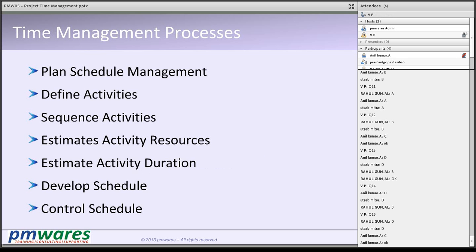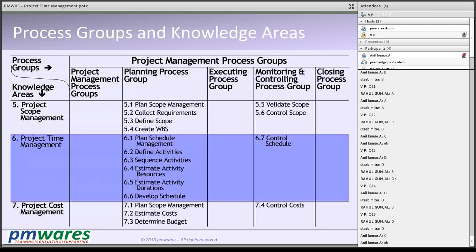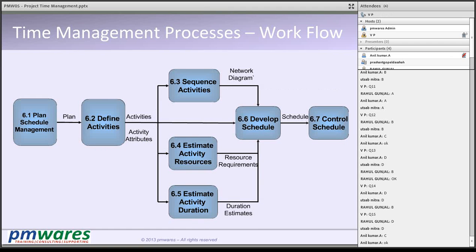Here we will understand how we can develop a schedule and how we can maintain it. If you prepare a Microsoft Project plan or a project schedule in Primavera or any other scheduler, time management is actually the principles behind those tools and the methodology used — your scheduling concepts. There are seven activities in this: six of them are in planning and one is controlling, so you can understand the gravity and importance of planning. The first is the plan schedule management — prepare a schedule management plan covering how you are going to develop the schedule, what methodology you will use, what tools, your units of measure, and how you are going to track it.